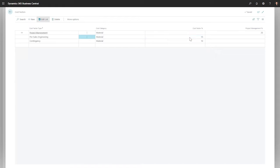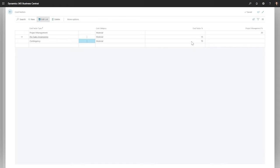For example, this firm doesn't create the job until the PO is received and wants to capture the pre-sales engineering per job as opposed to general overhead. Along with that, a 10% contingency is added to help out with all of this supply chain instability lately.